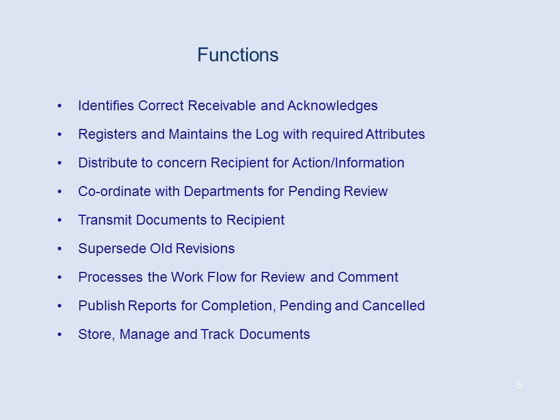What are the functions of document controller? Identifies correct receivable and acknowledges. The moment document controller receives the document, the first activity is to put the date stamp. Why? You have to track sometimes in your project where the delay has taken place, so dates on documents can help everybody to track such cases.